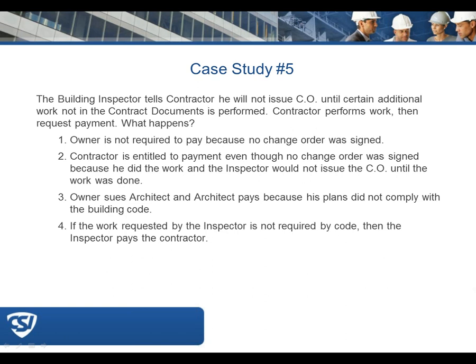And we have some comments here. The contractor is required to report the requested work per the inspector to the AE to allow for due process. The AE may have additional information that would provide another reason for code compliance. And then lastly, in regards to your question for anybody's case studies on the inspection office, the item did happen on a project in Tampa where the inspector brought up an item after it was already covered up, and the AHJ negotiated with the GC to correct the issue.